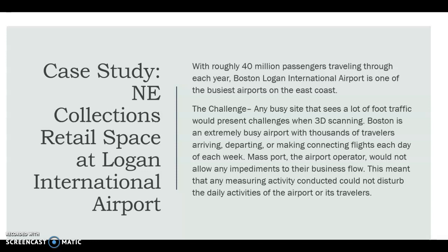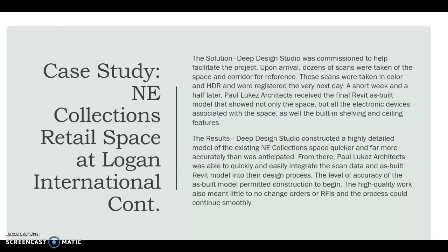Massport, the airport operator, would not allow any impediments to their normal business flow. That meant that any measuring activity could not disturb the daily activities of the airport or any of the travelers getting from different terminals, taking off, landing, and so on. That can be a huge challenge, again one of the cons of trying to get this kind of software up and running.